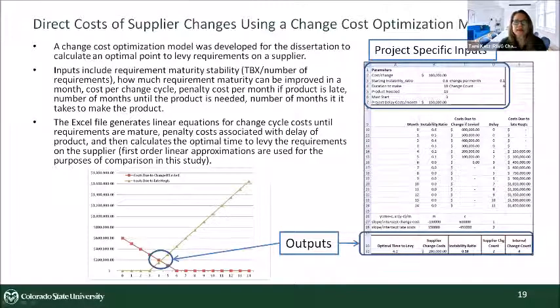And in a perfect world, the supplier will only charge you for changes that drive rework or have some significant impact. But in the real world, what they will often do is have some sort of opportunity to deal with the fact that they even have to look at your changes. They have to incorporate the changes into their paperwork. They have to have their team start working to the new things. It's impactful on many other levels as well. So there's just this cost associated with that. The more times you have to put them under changes, the more times you'll ultimately have to pay that cost.